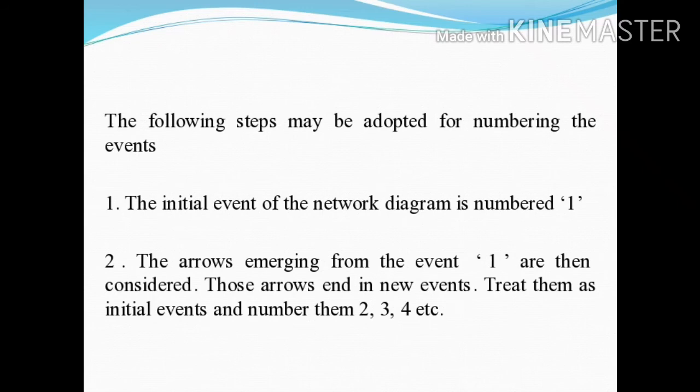The first step is that the initial event of the network diagram is numbered 1. The second step is that the arrows emerging from the initial event are then considered. Those arrows end in new events; treat them as initial events and number them 2, 3, 4, etc.